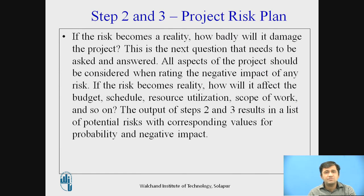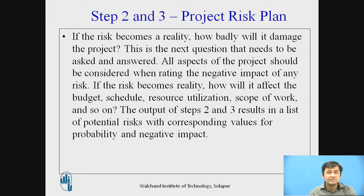If the risk becomes reality, how badly will it damage the project? This question has to be answered. All aspects of the project should be considered when rating the negative impact of any risk. We have to analyze and consider all negative impacts of that risk. If the risk becomes reality, how will it affect the budget, schedule, resource utilization, scope of work, and so on?